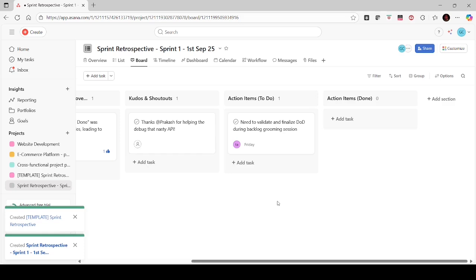At the next sprint retrospection, if the sprint duration is 2 weeks, then after 2 weeks we can identify what action items were identified in the previous sprint and what their status was, whether done or still in to-do, and based on that, further corrective action can be taken at this sprint retrospective event. The sprint retrospective event is actually to identify what problems occurred and whatever good things happened, so that we can make the required adjustments.